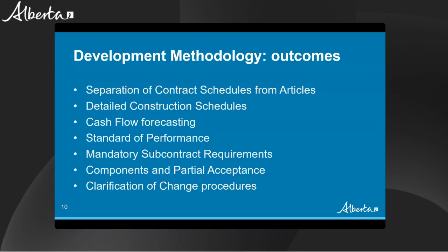And then changes. We also received feedback about change procedures being unclear at times under various contract forms and models. We've addressed this with a comprehensive revision of the change procedures and provisions, bringing the relevant provisions together under a unified article and a single schedule, which can be followed in a stepwise fashion whenever changes are made or proposed. The change procedures are also better integrated with associated schedule and payment impacts, addressing the feedback we received that indicated confusion and misalignment of approaches to the impact of changes.